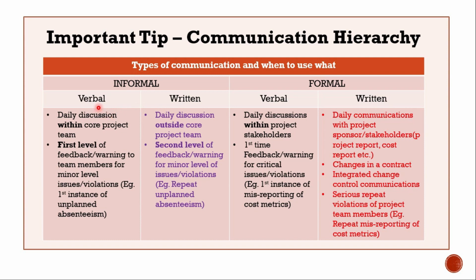Let's say informal verbal. You use this mainly during daily discussions within the core project team. For example, when you are discussing the day-to-day activities of a project within your project team, you use this informal verbal communication. You use informal written communication for daily discussions outside your core project team. Every project has a core team and an extended team, right? Your project cost analyst is part of your core team, but maybe the regional cost analyst is an example of a member of the extended team. So if you want to share some updates with the extended team, or if you need any information from that team, you generally use informal written communication.